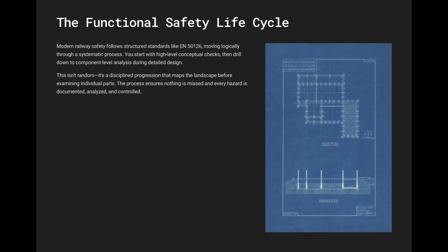Okay, let's unpack that process then. Because you don't just jump into analyzing microchips, right? You start with the bigger picture. That's right. You map the landscape first. And the very first step, when the design might just be scribbles on paper, is the preliminary hazard analysis, PHA. It's foundational, absolutely essential, and happens during that early conceptual design phase. Things are still emerging, maybe a bit fuzzy.